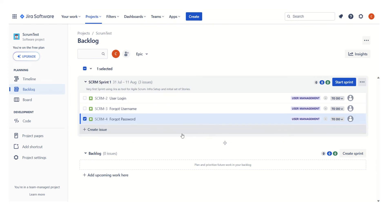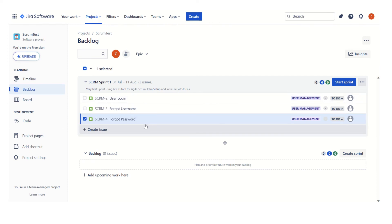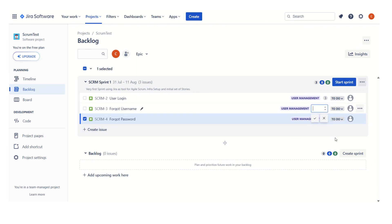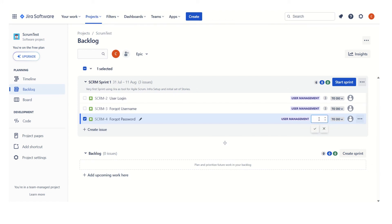Another thing is: all these user stories, since we are using the Scrum process, are not yet estimated. There are other things like how we can assign stories to a particular user and how we can assign story points. Let's understand how to assign story points. There is a field here for story points. User Login is going to take three story points — using a one, two, three, five scale. 'Forgot Username' is also going to take three story points, and 'Forgot Password' is going to take two story points.